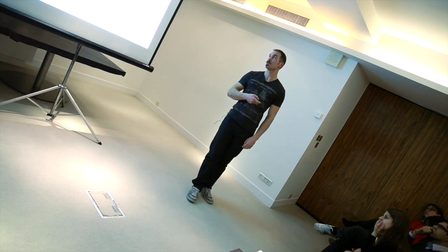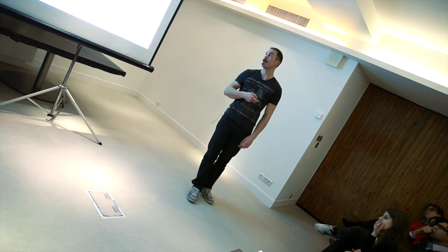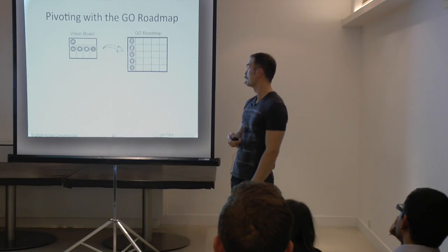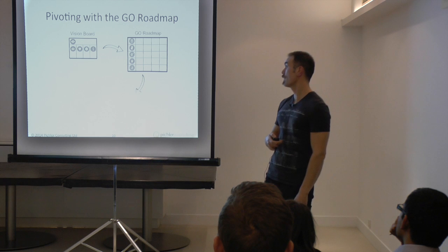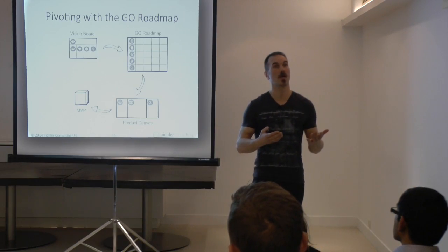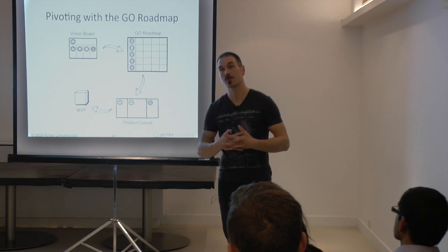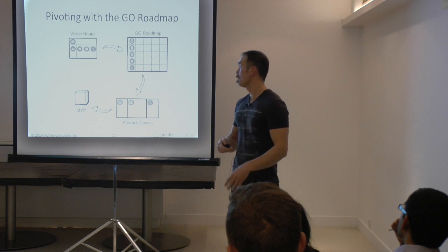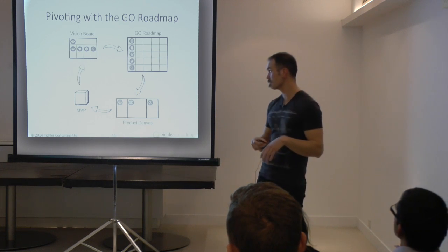First of all, again, we need to do a little bit of upfront validation work, think about the market and the business model. Then we build our roadmap. That's at least what we've said so far. Use it then to create something like a backlog or product canvas. And then the team would build something tangible, a prototype, product increment, or MVP, minimum viable product. And based on that MVP, we would collect feedback, data from users and customers, and analyze it.